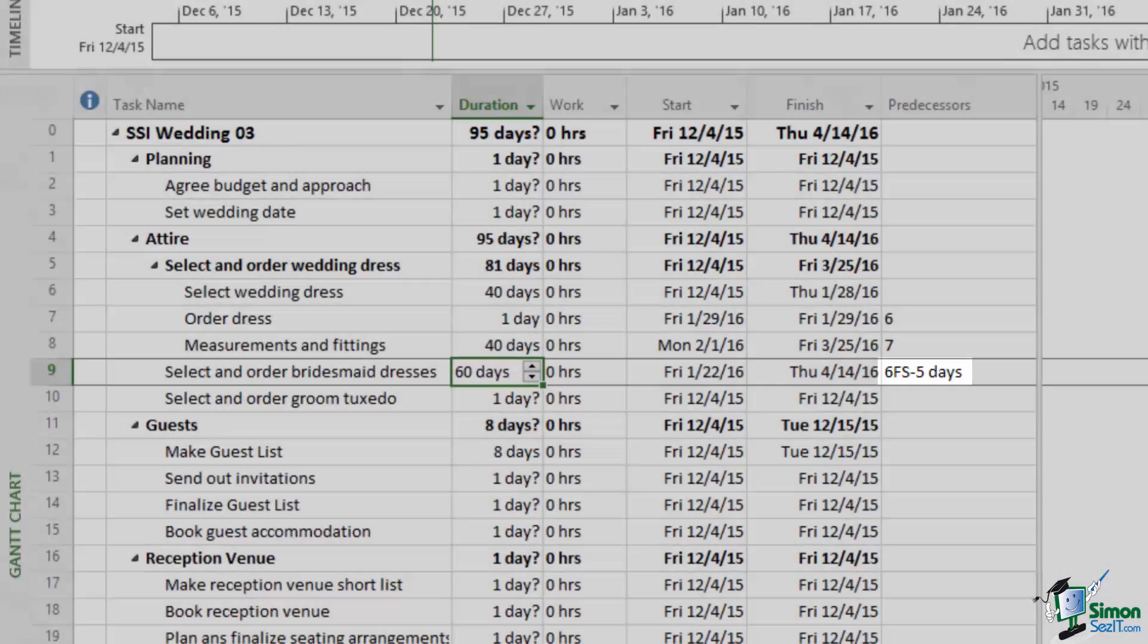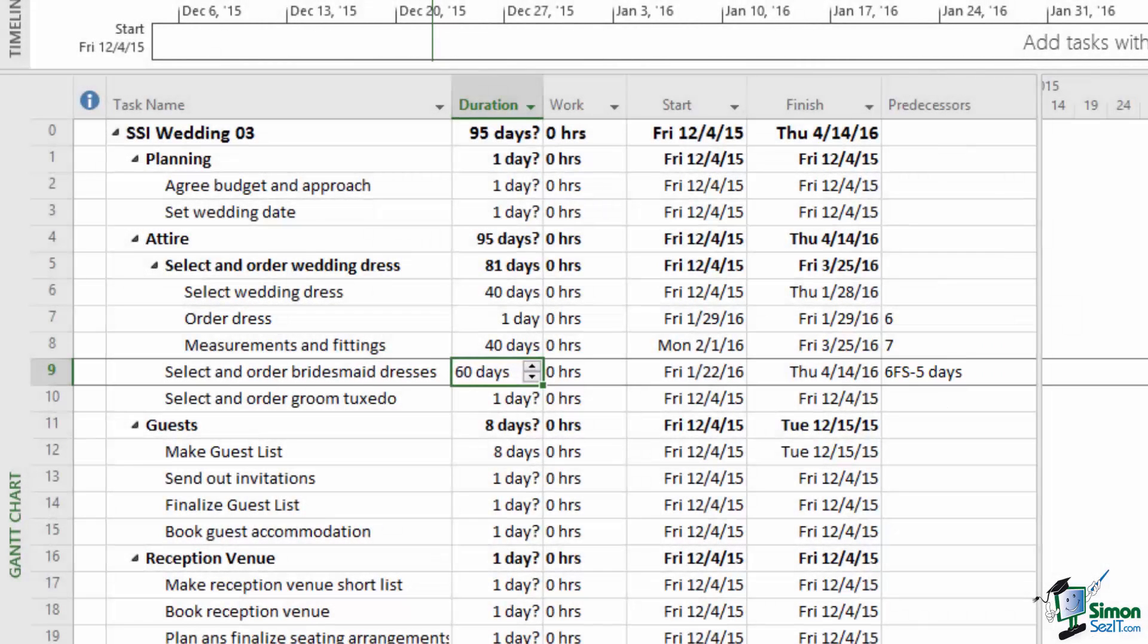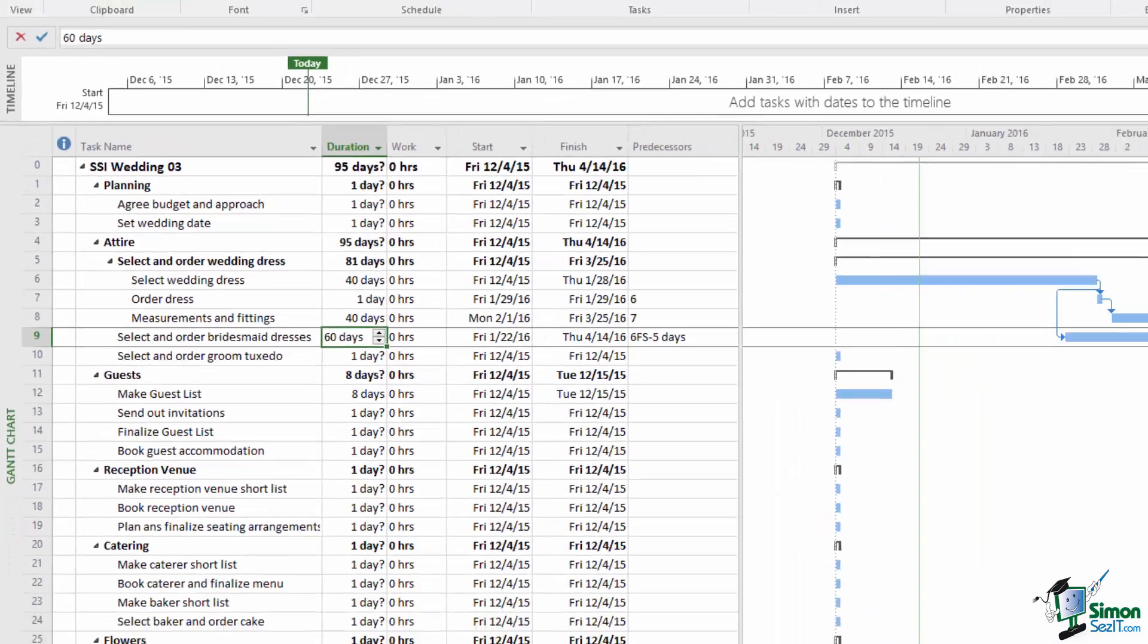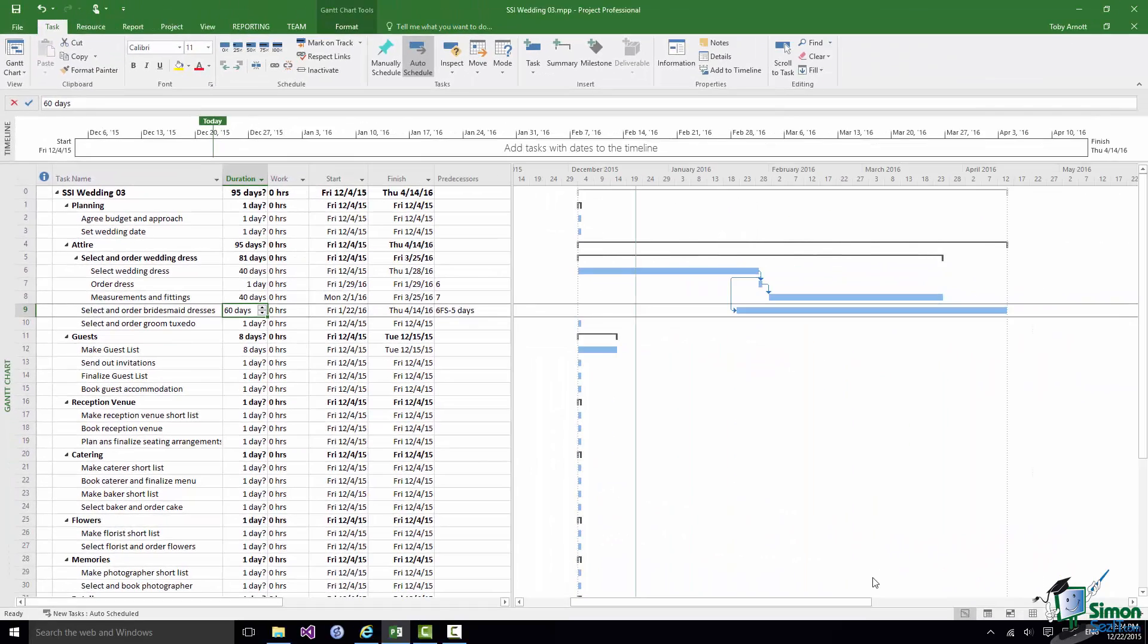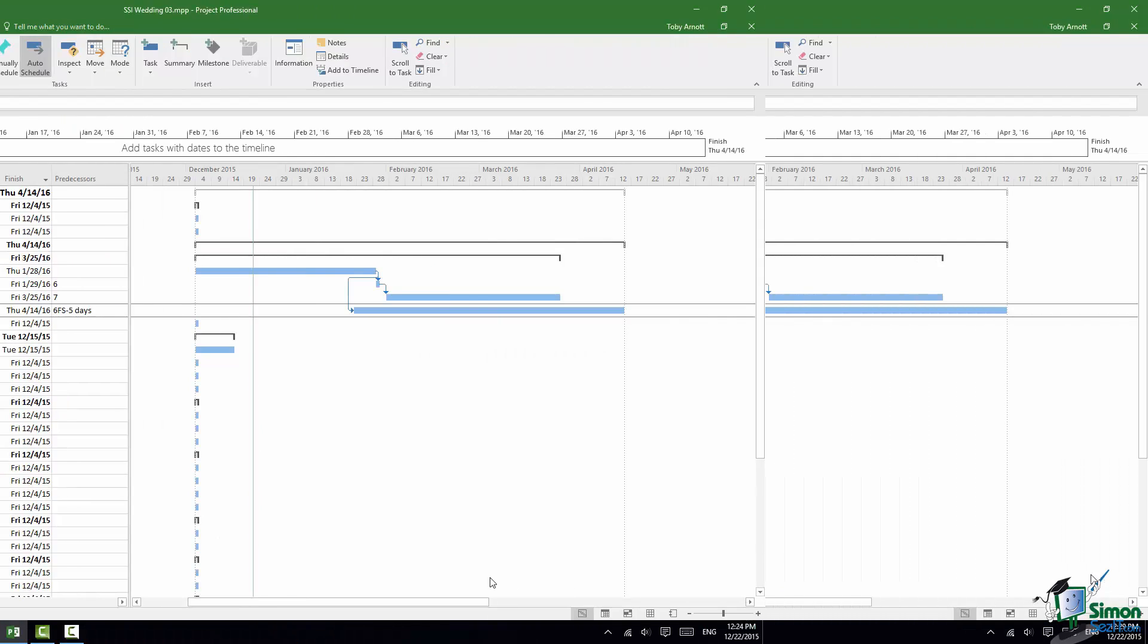And whenever there is anything other than a standard default Finish to Start relationship, so if it's any other type of relationship or if there is lag or lead you'll see that coded in the Predecessors column.